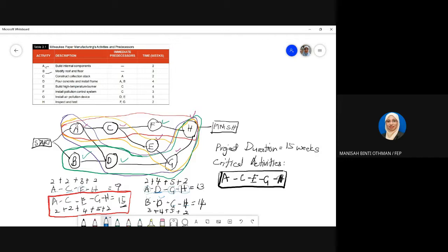So it involves a crash course. It involves cost that is quite difficult, so the coordinator doesn't want us to take it up in this course. So it involves cost. Yes, you can make it shorter for a critical activity if you already delayed another critical activity. You can make it, but there is an additional cost.